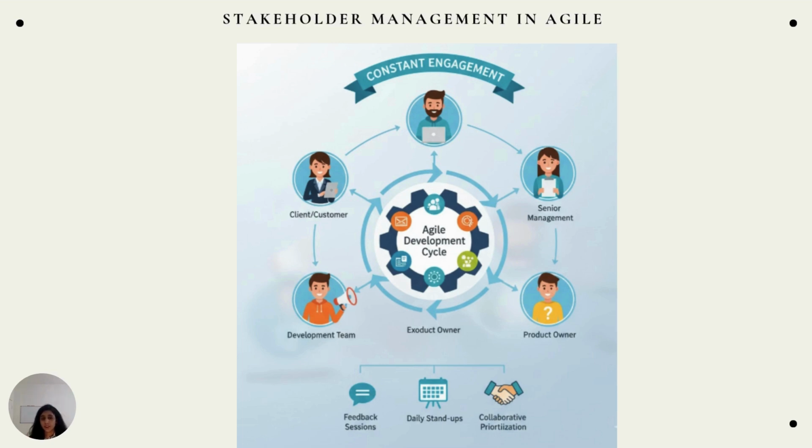So this could be one of the questions. Definition of done is crafted way before the project starts. It's in the agile team charter, not after we start working. So definition of done is crafted in the agile team charter. The DoD is a single, consistent set of quality requirements applied to all tasks. We focus on the ultimate outcome that defines the success.